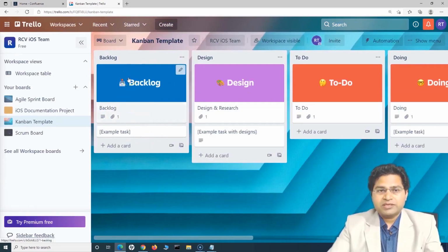Okay, so now as you can see, overall the boards have similarity. Scrum and Kanban boards will have similarity, but in Scrum we follow time-bound or fixed-time sprints, right? So we have this 2-week sort of sprint as development, and then we have a fixed set of requirements that we need to deliver in a specific time frame, 3 to 6 months, or we have the set of requirements. But in Kanban you can have sprints. Teams do sometimes follow the sprint or the time-bound sprint as well, but then it is more suitable for the teams who have a continuous flow of work.